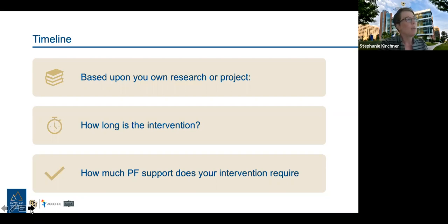So I think a lot of times, with timeline, and we're going to talk about this a little bit with dose too, we're talking to researchers about data collection, and there's this drop-dead date at the end of a project by which data needs to be reported. So think backwards from that about when you can collect it from a practice, because facilitators end up being really, really essential in nudging practices to get data to project teams.